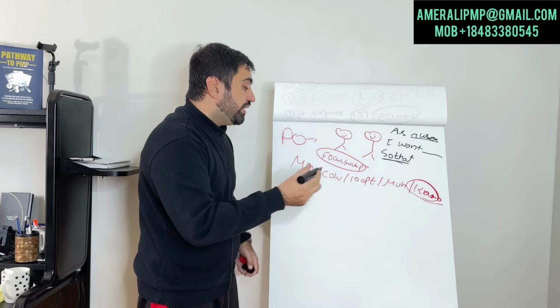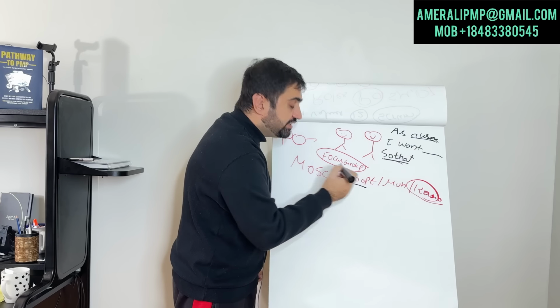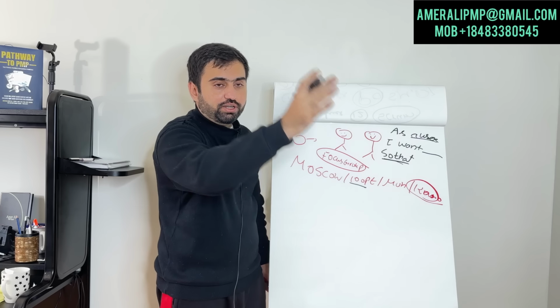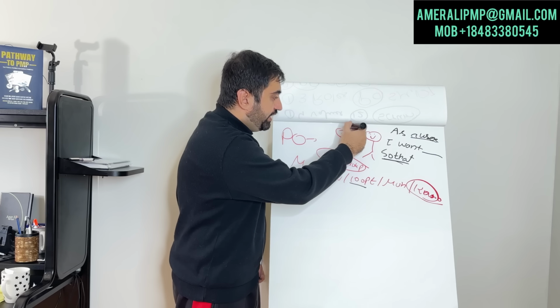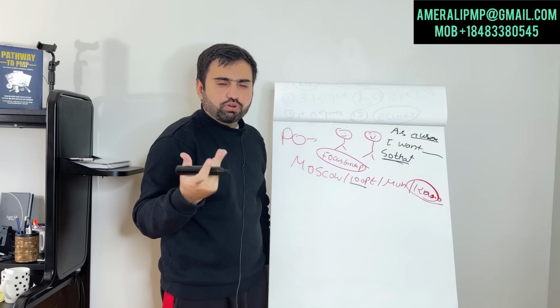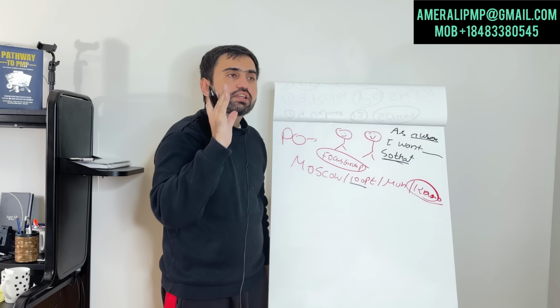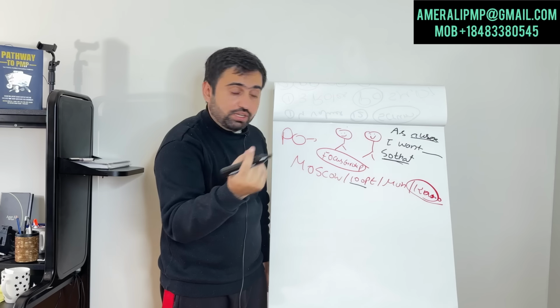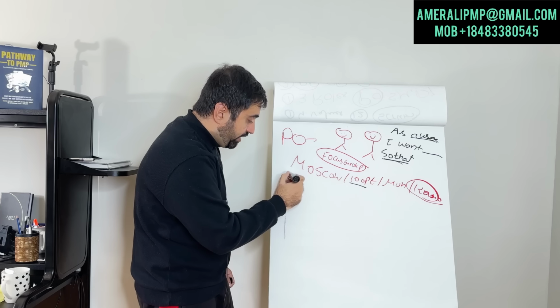Similarly, sometimes multiple people can say that this is the must requirement. So what I will do, I will say, okay, you have 100 points, he has 100 points, she has 100 points. Let's say 4 or 5 stakeholders are there. You can give all the 100 points to one user story. Let's say this is the product backlog.